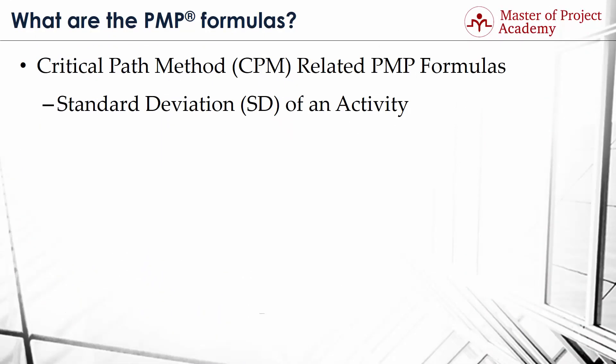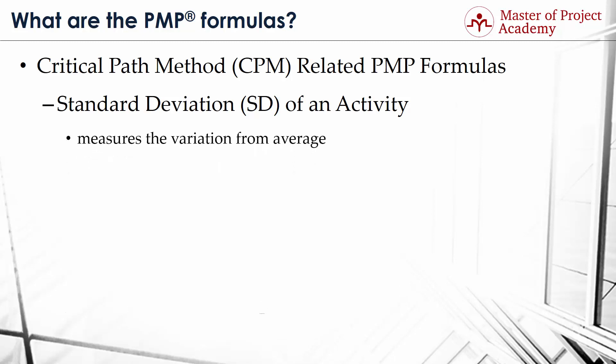Standard Deviation or SD of an Activity measures the variation from average. A low value of SD indicates that the data points are close to the average. On the other hand, a high value of SD indicates the spread of data points over a large range. Accordingly, the formula for Standard Deviation is as follows: SD equals P minus O, the result of which is then divided by 6.